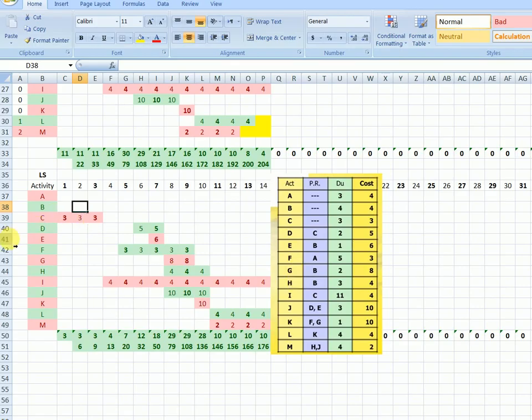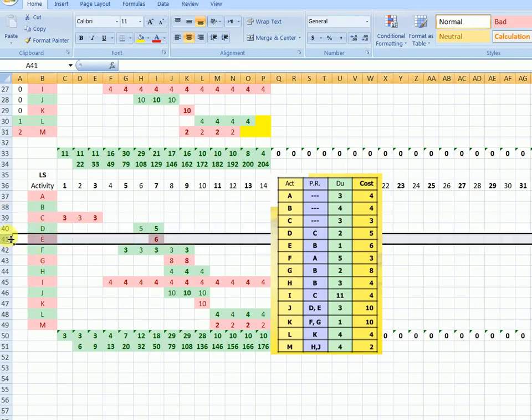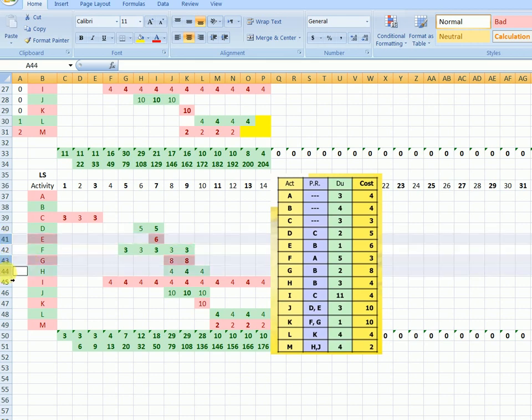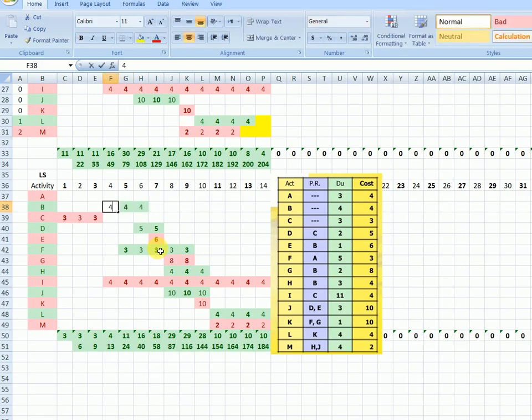Okay. B depends on E, G and H. We said E, so E is here, B has to be here, isn't it? How much is B? 4. Okay.